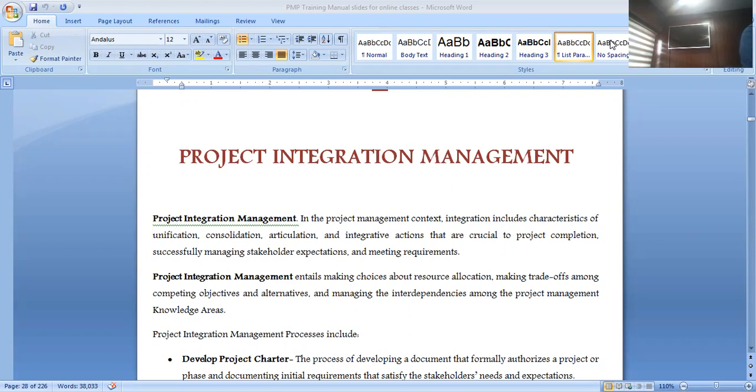We'll move down to what is called perform qualitative risk analysis, then perform quantitative risk analysis, then we will plan the risk response strategy. What do we do after that? We now start deploying the actual plans, and that is in the execution stage.